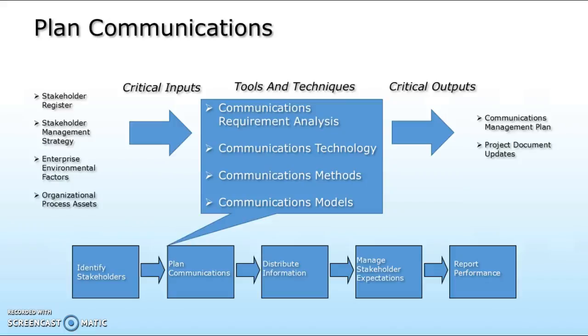Communication requirements are the sum of the information requirements of project stakeholders. Requirements are defined by combining the type and format of information required and the analysis of the value of that information. Project resources should be expended only on communicating information that contributes to the success or where a lack of communication can lead to failure. So choosing the right communication is key.